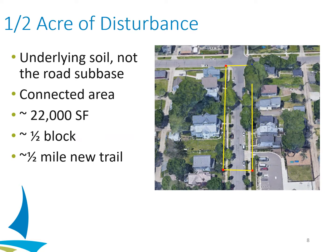To define what triggers that one-half acre of disturbance: you need to disturb the underlying soil — not the road base material. So if you're doing a project that's just concrete rehab or mill and overlay and you're not reaching the underlying soil beneath the road base, that does not count. The area also needs to be connected. If you have a roadway with a series of intersections seeing improvement and they're not connected and are separated by street, that will not trigger the ordinance unless one of those areas results in a half acre of disturbance.